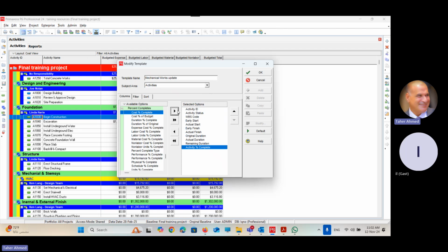I will send the Excel sheet at the beginning of the week, and I will receive it by email at the end of the week. I don't have to repeat the data entry again. All I have to do is just import this file to Primavera and click F9. That's all. It is great, by the way. I don't know if you like it or not. It is great. One of the great features. Yeah, I think so. Yeah, it's a good practice in a business project. Yes, that's why I put it.